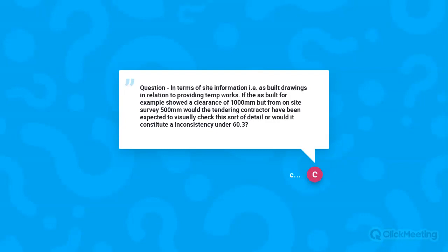I think you've got a conflict, because your site information says one thing, but your visual inspection says another. So I think, yes, your inconsistency clause will probably help.